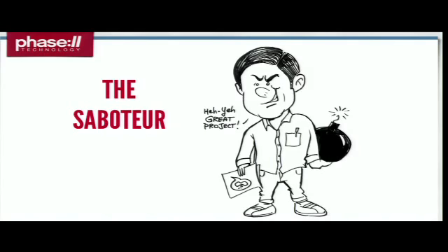In some cases, these are people who have a vested interest in, say, job security. In the open source world, we do a lot of moving people off of licensed software. Well, guess what? Those licensed software vendors were pretty smart. They got people trained and certified, and those people are getting their job security out of that old system that you're migrating out of. They have a vested interest in making sure that your project fails so that it stays on their platform that they're certified on. That's one type of saboteur.